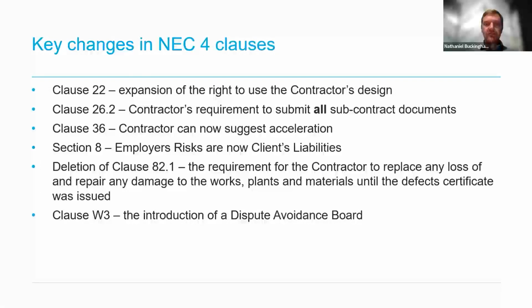The NEC4 contract introduces some changes to existing NEC3 clauses. Some of the key changes include, firstly, in clause 22, the right for the client to use the contractor's design has been expanded slightly by referring to other purposes as stated in the contract, rather than just being as stated in the works information.